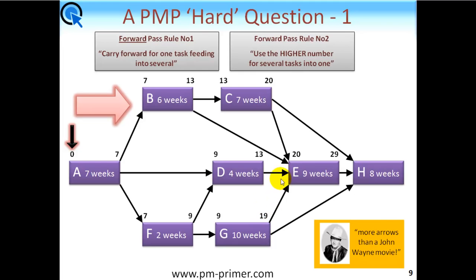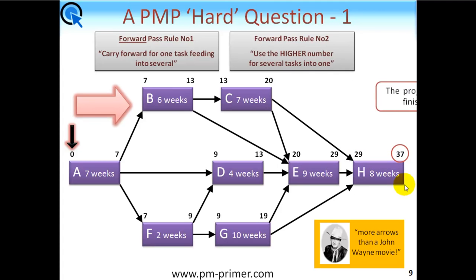Now we're coming to some multiple choices. Task E has four inputs — follow each arrow back and find the highest number. Out of the four, 20 is the highest, so 20 comes here. Plus nine gives you 29. Task H, the final one, is fed from three tasks — again, which is the highest? It's 29 which wins the day. So 29 goes here, plus eight gives you 37. And this, of course, is your project's earliest finish time. This is a so-called hard question — that wasn't very hard at all!